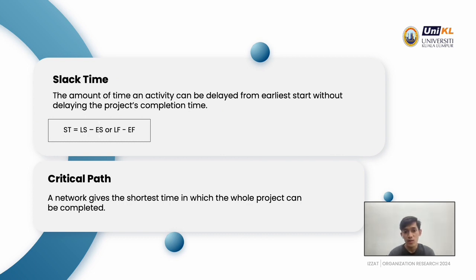There are two formulas. The first one is we take the late start and subtract the earliest start, or we can use the late finish and subtract the earlier finish.